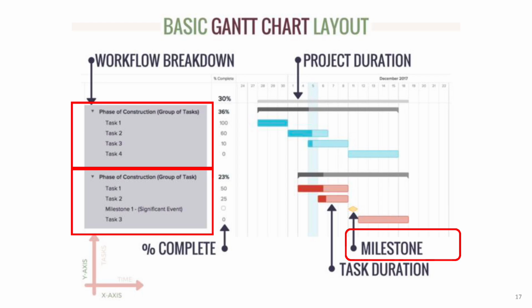Milestones are another key element of the project schedule. They mark major achievements or the completion of critical tasks. On a Gantt chart, milestones are usually shown as diamonds or markers along the timeline. They help track progress and make sure the project stays on schedule. For example, in a construction project, milestones might include completing the foundation or the structural frame. This gives everyone a clear view of the project's key accomplishments.